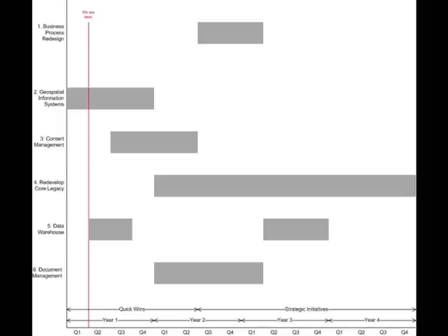So finally, we redraw the diagram, we get rid of the grid lines, we get rid of the confusing use of colours, and we can now introduce some extra information such as the faint red line that shows where we were up to on the Gantt chart. And so now we've got a clean, crisp, unambiguous message to give to our readers using the Gestalt principles.